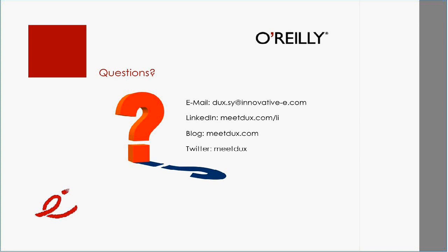Great. Is the change control portion only available for 2007 or for 2003? Very good question, Cheryl. The change control relies heavily on this technology called workflow in SharePoint. And workflow does not exist in the prior version of SharePoint. It's only available in Windows SharePoint Services 3 and Microsoft Office SharePoint Services 2007. So for your question about 2003, unfortunately, no. You cannot build that automated change control system in the prior version.